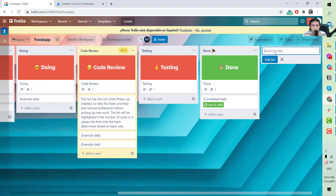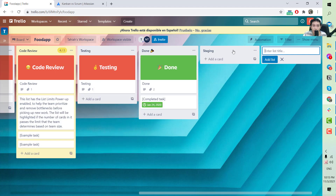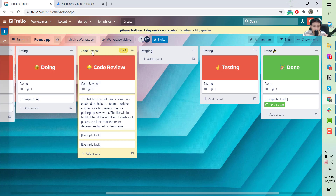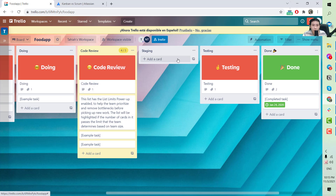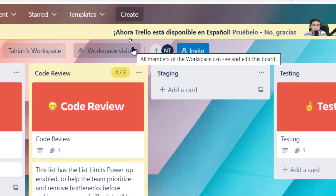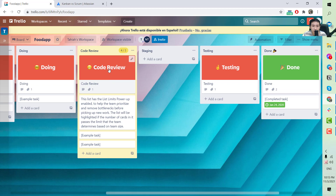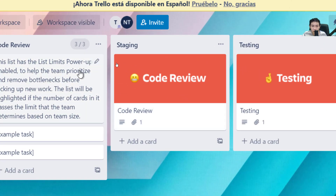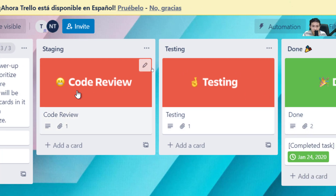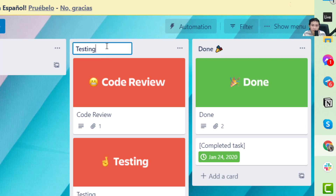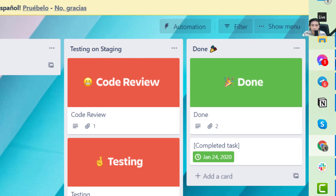The first additional column needed is Staging. After developers review the code, they deploy it to the staging environment — which is mainly used by QC and QA engineers for testing purposes and is not accessible to end users. When code is deployed to staging, the card moves to Staging, and when the QC starts testing that feature, it moves to 'Testing on Staging'.